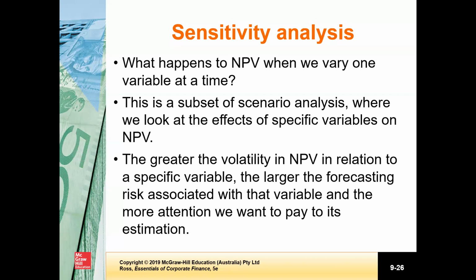In sensitivity analysis, on the other hand, we do not consider multiple variables. Rather, we keep all variables unchanged and manipulate one variable only to see how sensitive NPV is to that particular variable. If we see that NPV is sensitive to a particular variable, it means that variable is more important, so we should be cautious in estimating the cash flows associated with it.